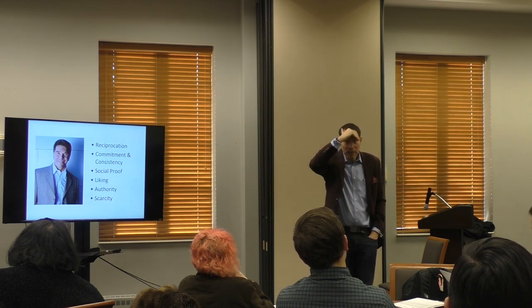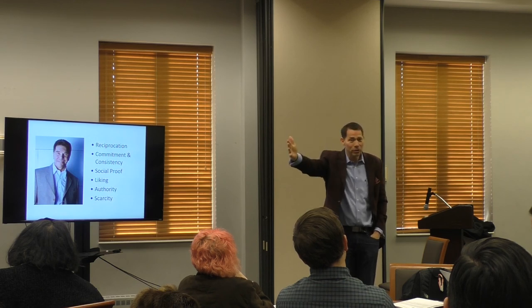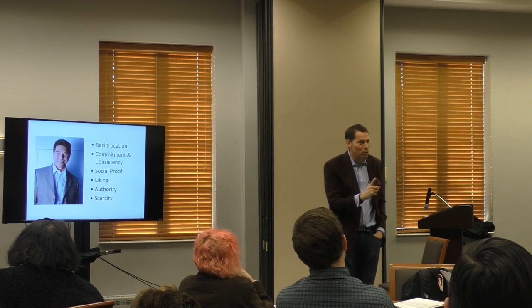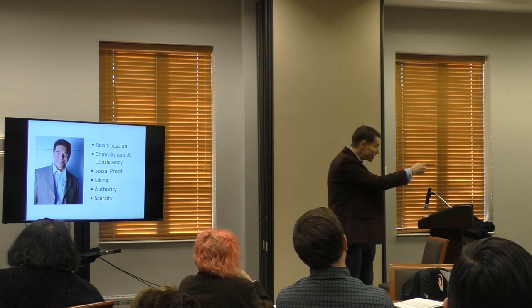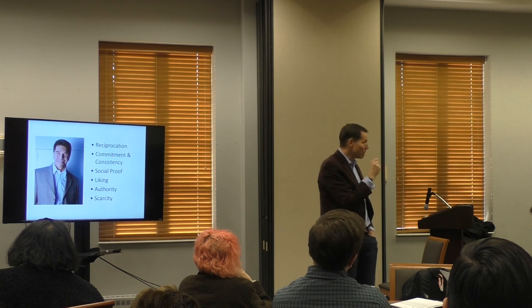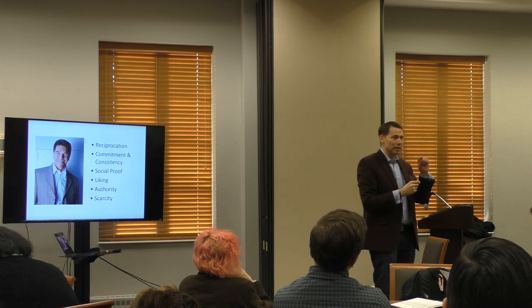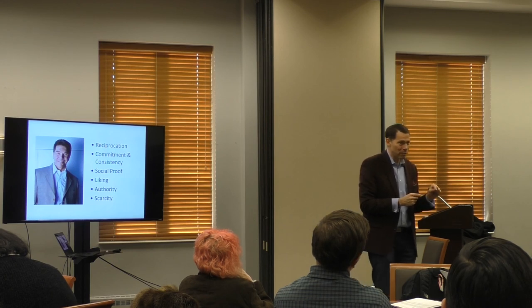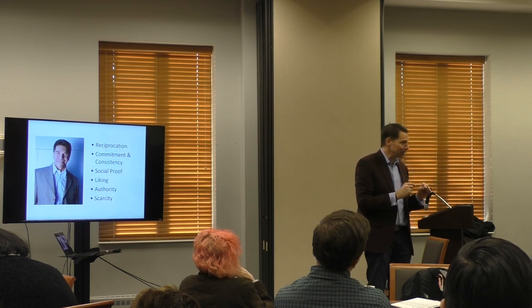The rest of us, after I read this, I'm like, I've been so lame. You know what I'd say to people? I'd say something like, hey, let me know if you have any issues. Let me know if you need anything. We don't ask for the commitment enough. So in this case, especially with volunteers, it might be, this assignment, this specific thing, will you have this done by our meeting on January 7th? The key on this one, pause and zip it.